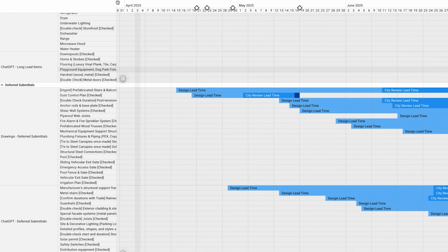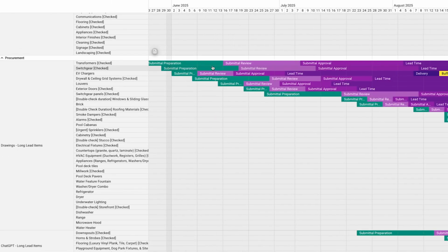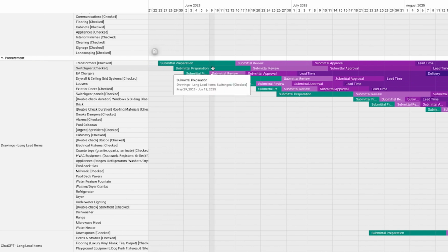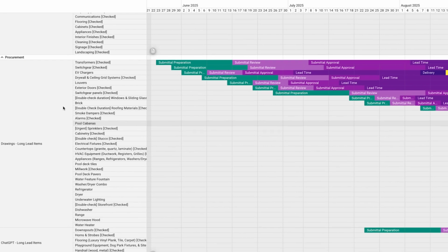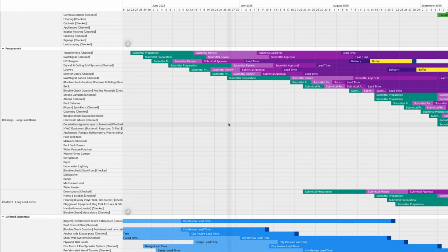Let me do a quick sidebar. When we're looking at long lead procurement items, people say, well, I don't have full specs yet, I don't have the full design. I don't care. Go type in the type of building you have. Tell ChatGPT where it is. Say thank you, first of all. And then say, hey, Home Slice, what are some things that are long lead? And give me the submittal prep, review, approval, and lead time for each one of them. ChatGPT does a great job. You plug it in, and at least you're managing it and identifying whether or not it's real.